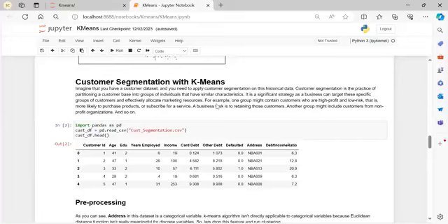So once the SOW is signed, every timeline and everything will be mentioned, and then, looking at when the resources and the team are available, we will decide on the kickoff date. In the kickoff, generally at a high level, the project managers and technical people will be assigned, the entire team will be introduced, and the customer will introduce the spokespersons from his side. All those discussions will happen and the whole plan for how we are going to execute will be discussed.